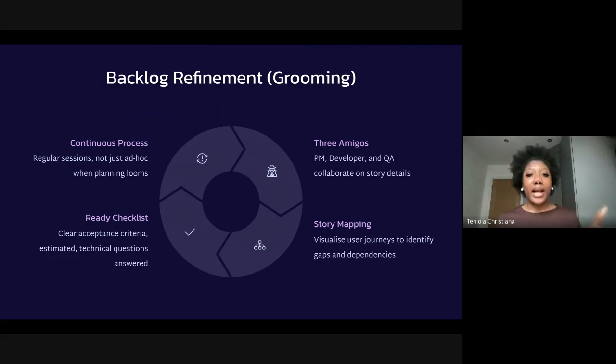I think for good practice, it should be something that's done regularly, once a month, once every 3 weeks, something like that. So really, once at the end of each sprint, you should understand, okay, are there issues that have been there for ages that are no longer relevant? Are there things that maybe we've neglected and we need to move higher up on the list? And maybe that's the next thing for the sprint. So it's an ongoing process. And it can't just be ad hoc when you know a sprint session is coming. It should be something you really try to keep on top of.